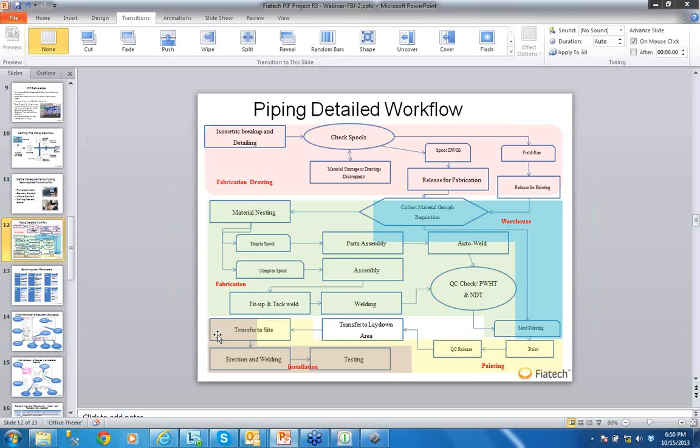If you want to know, for a specific area in the project, at this elevation of the pipe rack, how many welds you need, how many pipes, how much square meterage of painting, you were able to grasp this information because it was transported back to the 3D model.